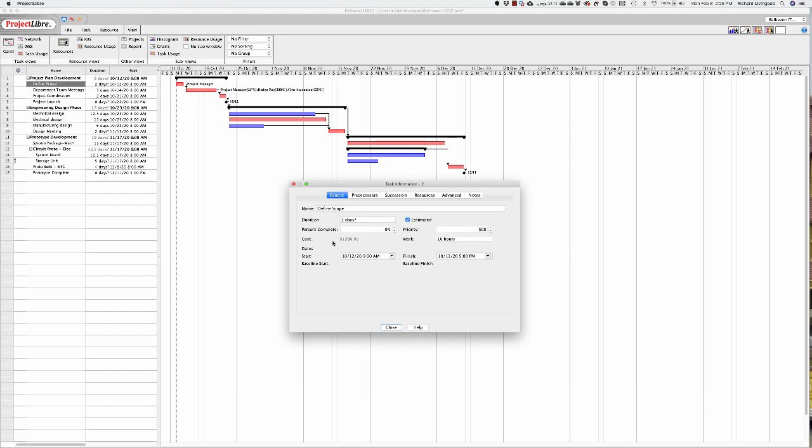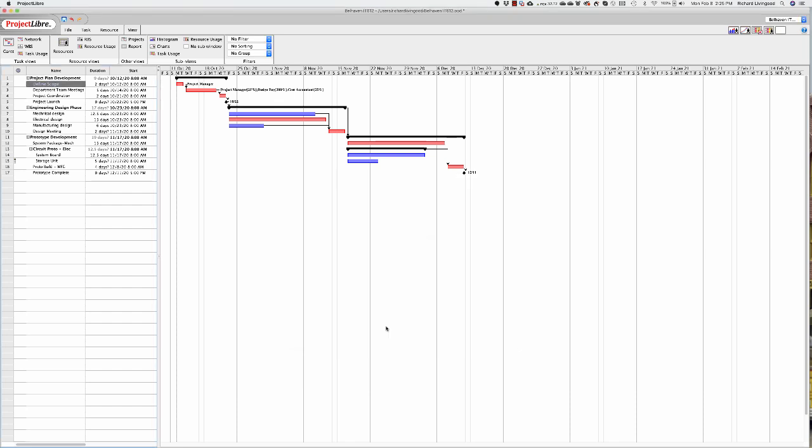And if we're not, because you always say to yourself, okay, is this right? And it is. So if you have 16 hours worth of work, 2 days worth of work at $80 an hour, $1,280. So it's $1,280 just for the project manager to sit down and work through the scope.